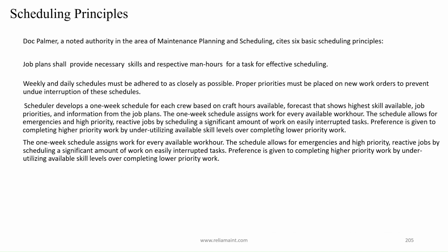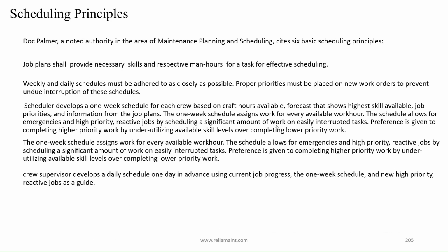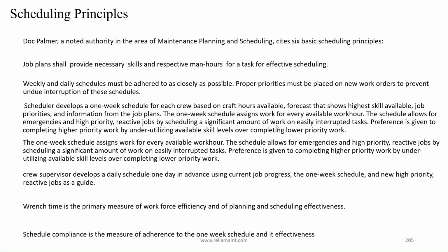Scheduler develops a 1-week schedule for each crew based on craft hours available, forecast that shows highest skill available, job priorities, and information from the job plans. The 1-week schedule assigns work for every available work hour. The schedule allows for emergencies and high priority, reactive jobs by scheduling a significant amount of work on easily interrupted tasks.